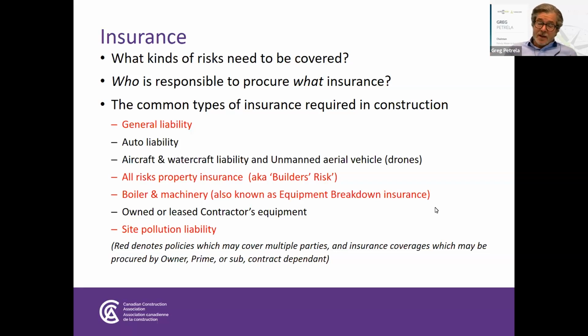So I'll say that construction insurance or commercial insurance in general, but insurance with respect to construction contracts falls into kind of two categories. There are first party risks, where a party will purchase insurance to protect their own property, such as your own equipment or your own vehicles, or damage to the project itself. That's considered a first party coverage.